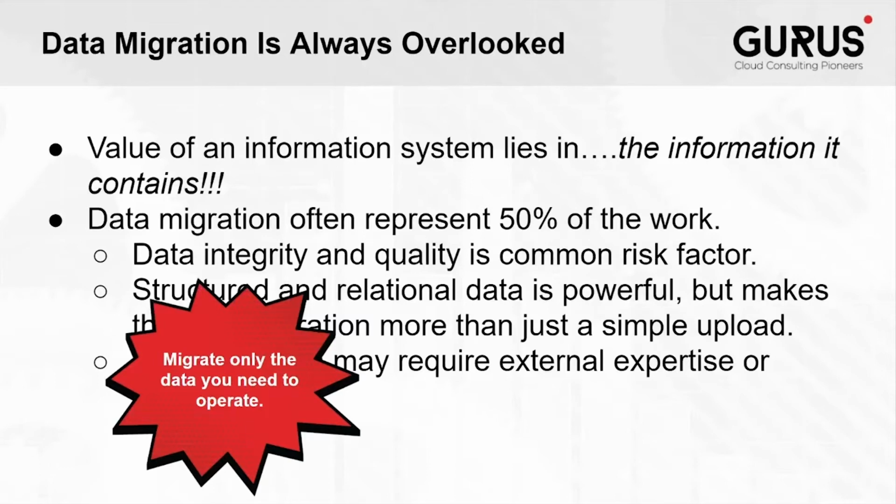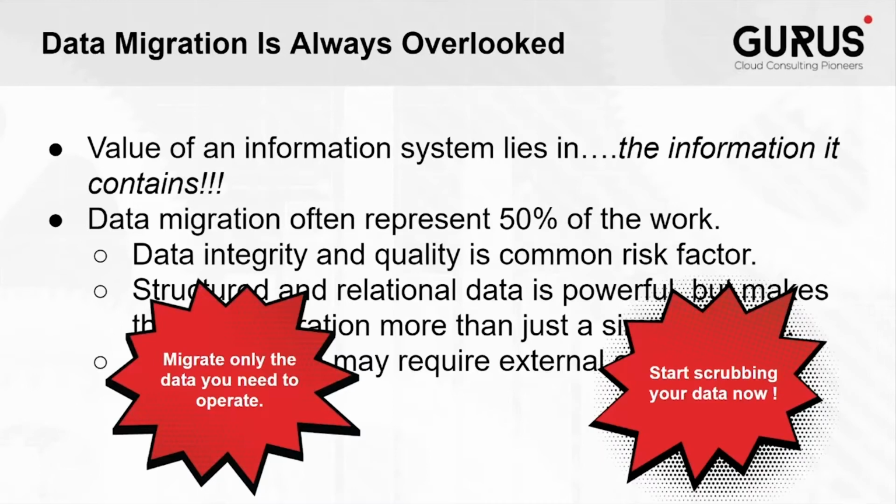In order to go live in the first phase, the best practice would be to only migrate the data you need to operate, and to start the data cleaning process as early as you can so that it does not hold up the project or the go live.